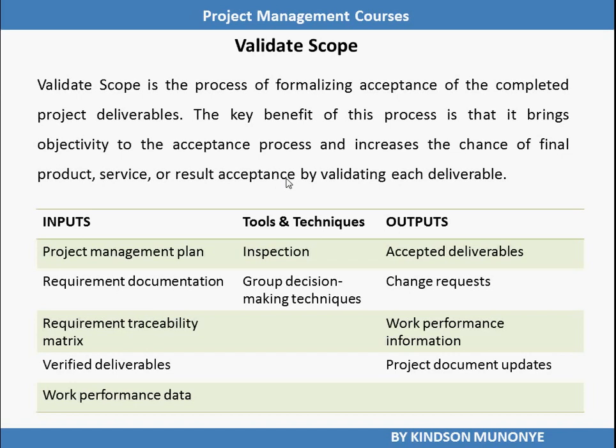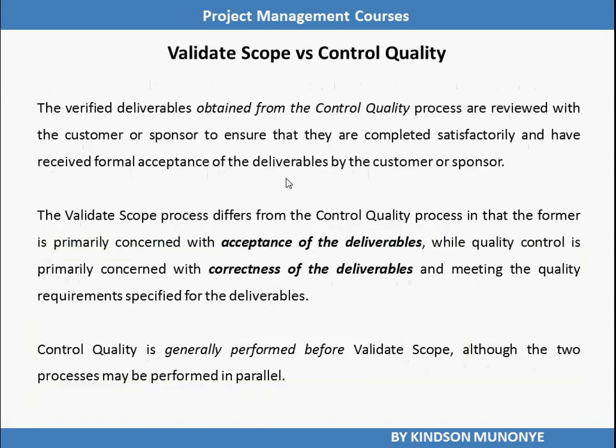Verified Deliverables is an output of the Control Quality process under the Project Quality Management knowledge area. Just know that Verified Deliverables is an output of the Quality Management process. The fifth input is Work Performance Data. There are two tools and techniques: Inspection and Group Decision Making Techniques. The outputs are Accepted Deliverables, Change Requests, Work Performance Information, and Project Document Updates.